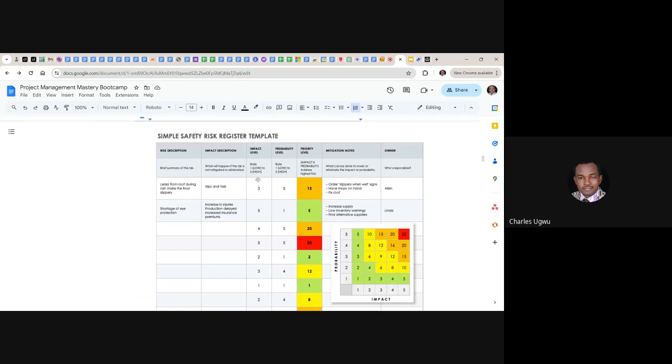Giving it 5 is a critical situation when somebody falls from a slippery floor. But we know it cannot go to that level, yet somebody can really fall down and hurt himself. So we give it 3. So this is kind of a brainstorming. It's not automatic.